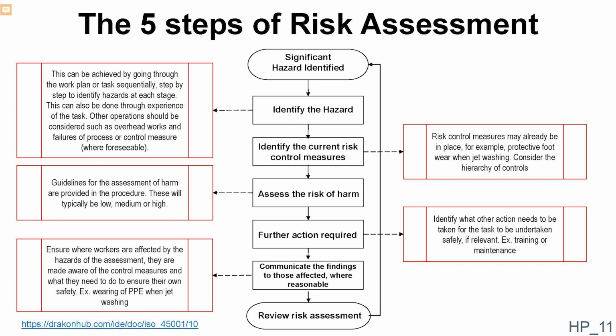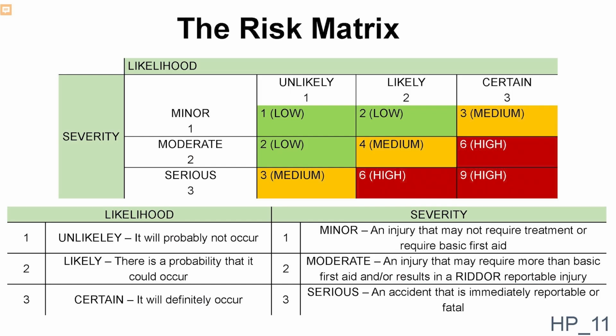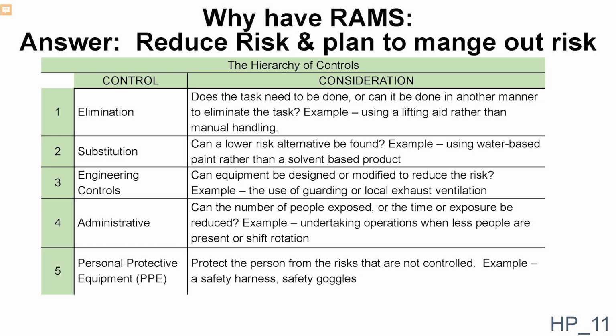And yeah, so that leads quite nicely into how we think about risk in terms of a scale of severity to likelihood. So that's kind of the vision thing: if it's obviously more likely and more risky, it becomes more dangerous. This is why we have RAMS, and what I've spoken about before: elimination, substitution. So elimination is asking whether the dangerous element is essential, so you might not have to do it. Substitution is using a lower risk alternative.